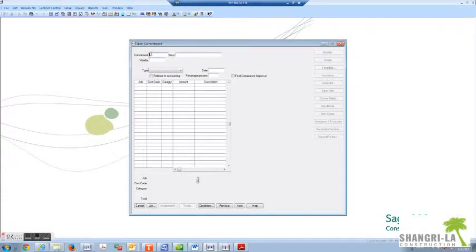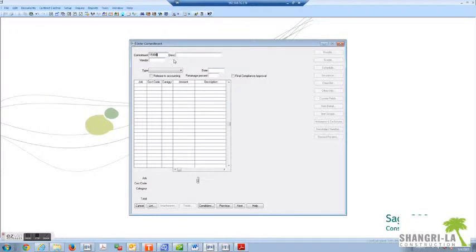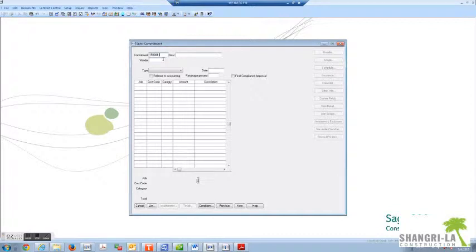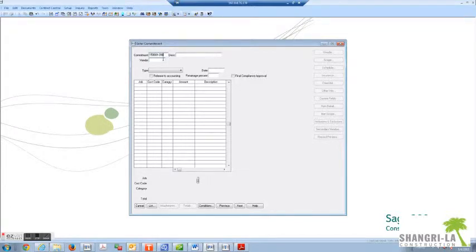In the commitment number you will enter a series of numbers that start with the job number. In previous trainings you learned that our job numbers are six digits starting with the year, for example 15 for 2015, and then the job number. I'm using a sample job number, then enter dash and then the CSI division. I'm going to enter 09 for things like drywall, then another dash and then the chronological subcontract or commitment number. In this instance I'm going to enter 04 because this is the fourth subcontract I've let under this CSI division.